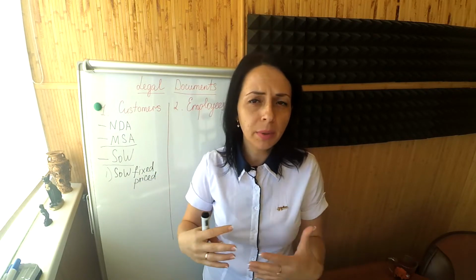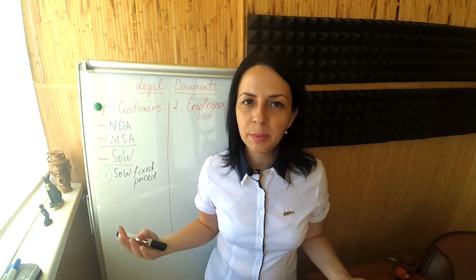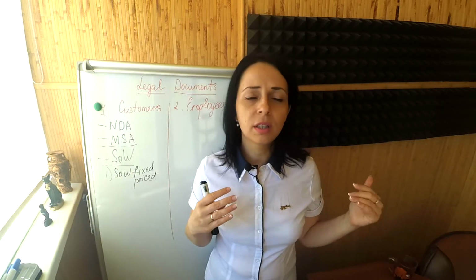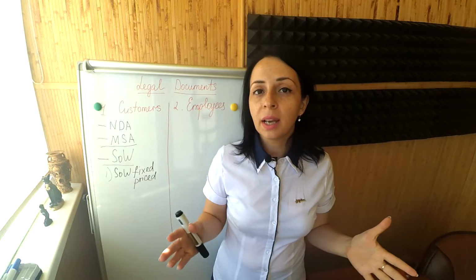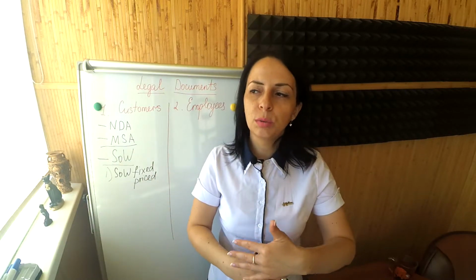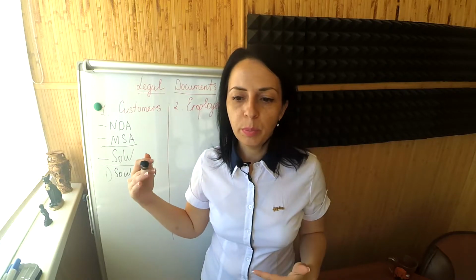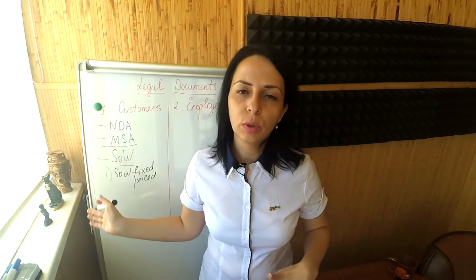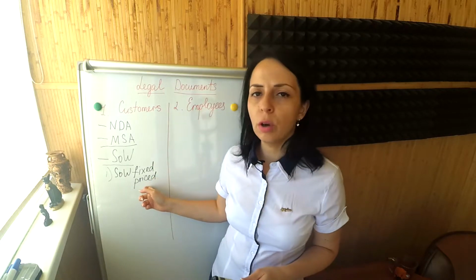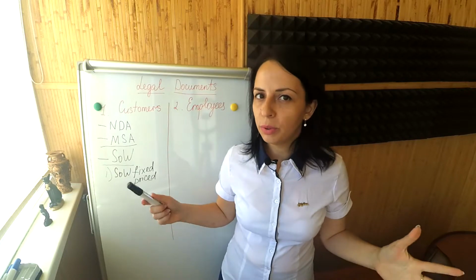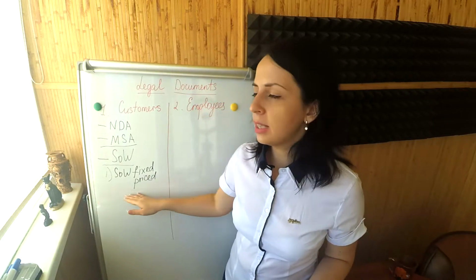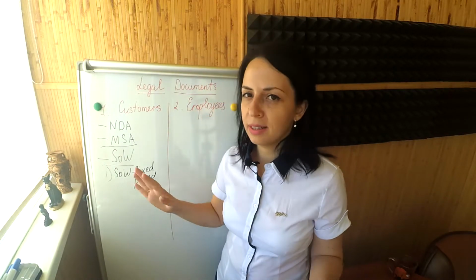than you have estimated. Something unforeseen, unexpected, and it might not be because of you, it might be because of the customer who provided the wrong data set, for example, and you have to spend additional extra time to redo everything, and they will just refuse to pay you extra, and all sorts of issues might arise. So I don't advise you going with the fixed price projects, but if you must, if you are willing to take the risk, then have this statement of work outlined somewhere in your folder.